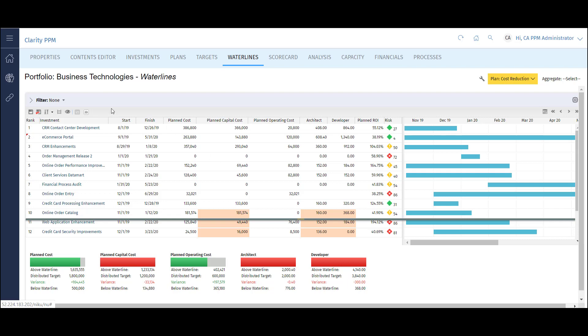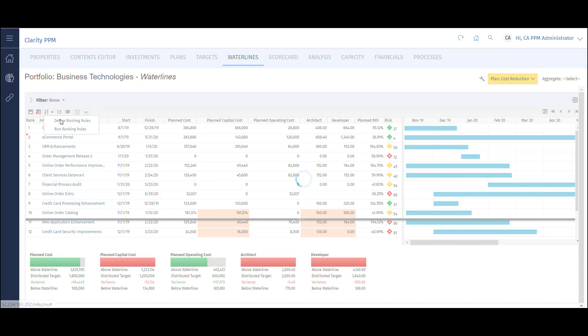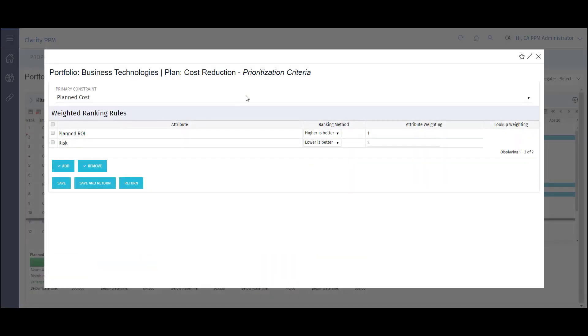We also have the ability to automate the ranking of projects in the portfolio. We can define ranking rules that allow for personalization and a prioritization of projects. For instance, I want to give the highest rank to projects with the lowest risk and the highest ROI. I set up a rule for each and allow the portfolio to rank the projects based on that criteria.